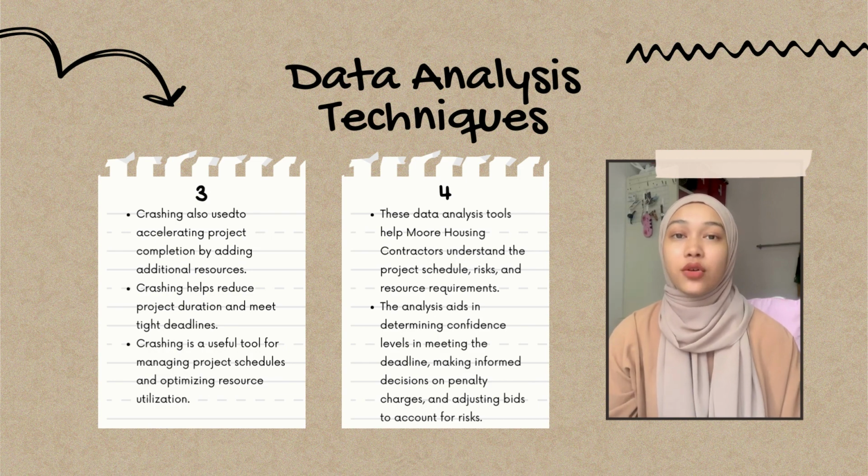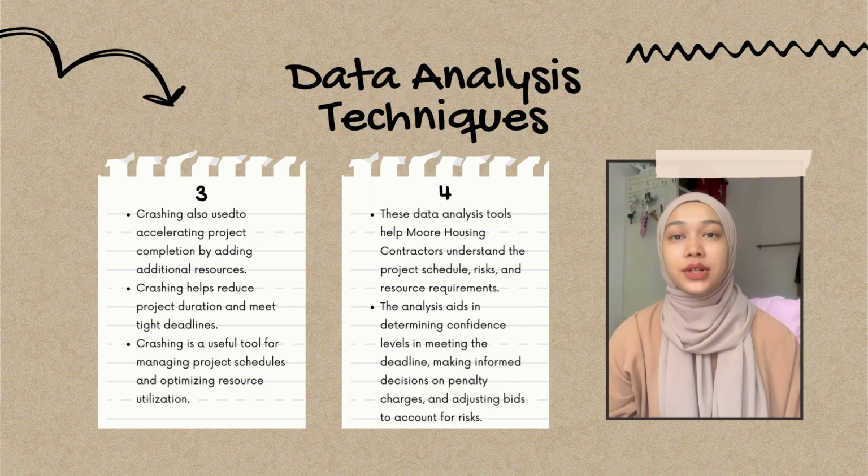Moreover, crashing is also used to expedite project completion. Crashing involves identifying tasks with the least possible impact on the project timeline and allocating additional resources to those tasks to accelerate their completion.